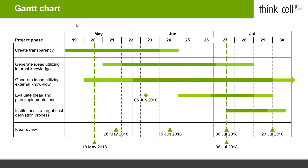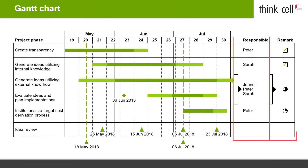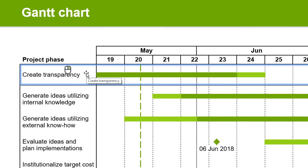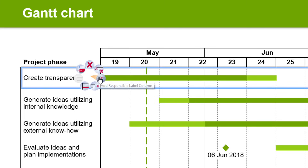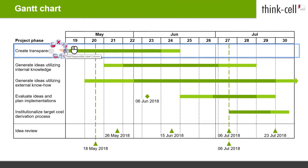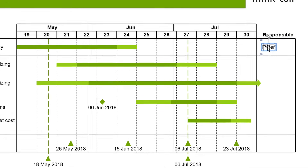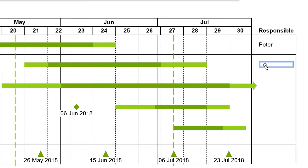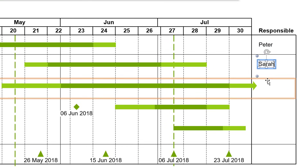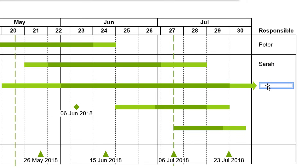For defining responsibilities, status, and remarks with regard to an activity, ThinkCell's Gantt chart offers you two extra columns. You add them by right-clicking into your Activity column and selecting Add Responsible Label Column or Add Remark Label Column. If you pick Add Responsible Label Column, for instance, a new column is inserted to the right of the chart labeled Responsible. Here you can enter the names of the people and teams who work on that particular task. Just hover over the row and click on the empty label you would like to fill — the label frame turns blue and you can start typing.